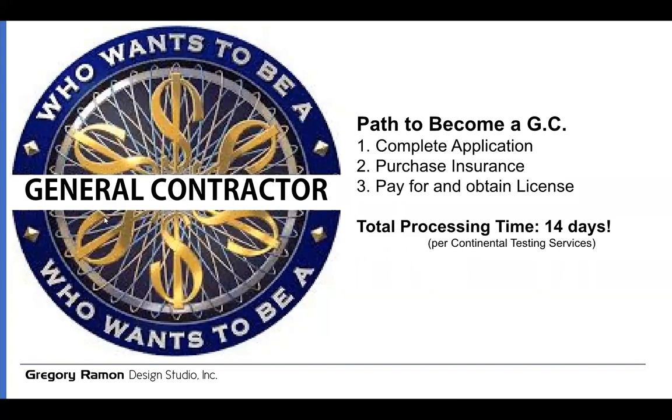So basically there is an application that you can download and complete. And the GC, if we're thinking about residential, selects their project value, meaning there's a certain class level. Typically for a lot of residential projects, Class E is the one that people will choose, because the ceiling on the Class E license is $500,000. So with a lot of the residential projects going on in the city, rehabbing bungalows, they're not going to exceed that amount. So a lot of people will choose that one. And the license fee for that is $300.